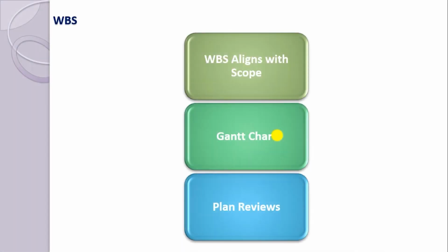Then comes plan reviews. More a technique than a tool, plan reviews help you to keep your plan alive. A plan review is a short meeting. It should not take more than 30 minutes, in which you review the project plan within a group of people. I always do it because it's very important that your plan, which you made 1 week before, reflects the current situation. Sometimes it needs replanning, and in practical scenarios it often does.